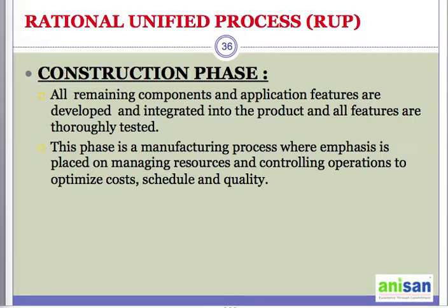This is very important because once the solution goes into operations during deployment, if this is not ready, stakeholders may say, I'm not interested, I was not informed, this requires additional resources and I need to plan for that. Not only plan: large organizations need to plan for the budget, and in an emergency, hiring itself takes three to four months. Once the person joins, they have to be trained and then deployed for various other work, right?